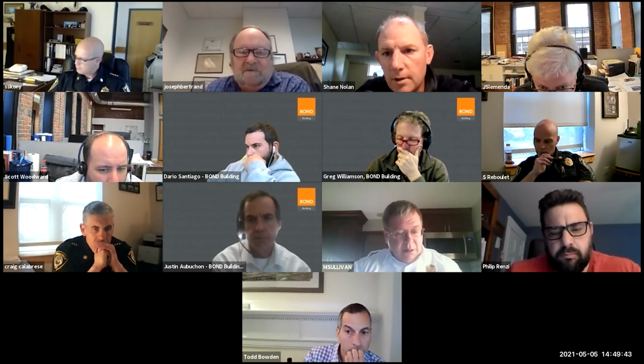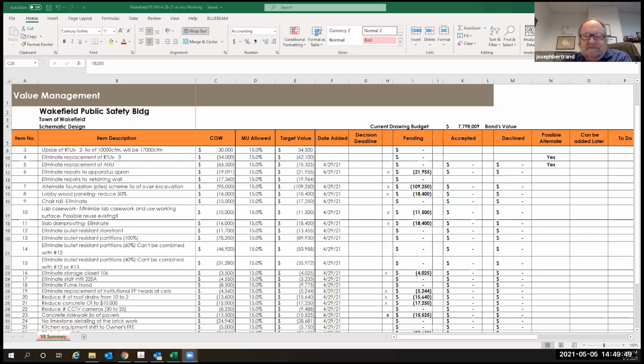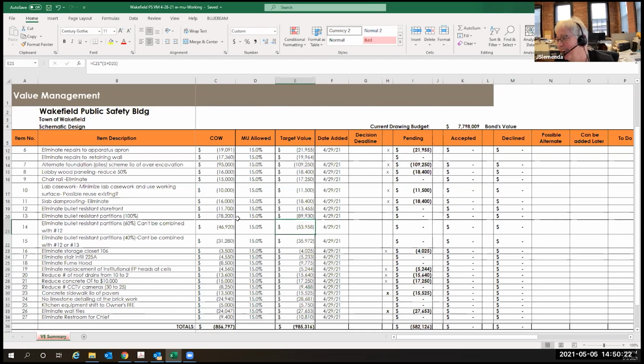So Doug, is that 40% off of the price or 60% off? I think it was down to 60% off. What was that number? 15. I thought it was 13. But 13 is to eliminate 100%. So maybe it's 14, right? So we're taking about 14, yep, 60% off. Okay. So we'll save about $54,000. Correct. Woo. One easy one.